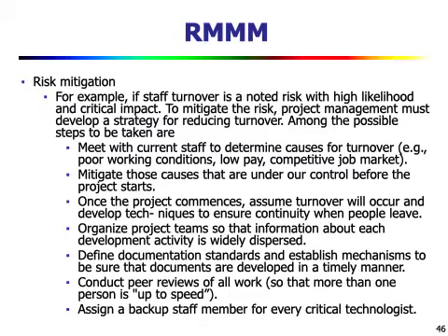Then organize project teams so that the information about each development activity is widely dispersed. Define documentation standards and establish mechanisms to be sure that documents are developed in a timely manner. Conduct peer reviews of all work and assign a backup staff member for every critical technologist. So this is a mitigation plan, and you try to mitigate using this plan.